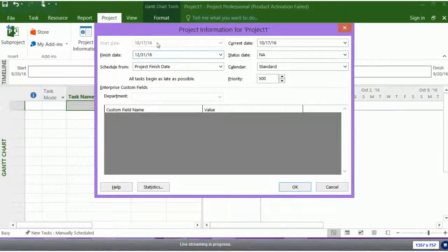So I scheduled backwards from the end of the schedule, and it calculates the start date. My concern about this is the logic hurts my head, number one, and number two, the start date oftentimes could be before today. So I schedule from the back end of the project, and then it tells me I should have started on Memorial Day back in May, and so we have a problem. And if you're not in the U.S., it's a holiday in May.